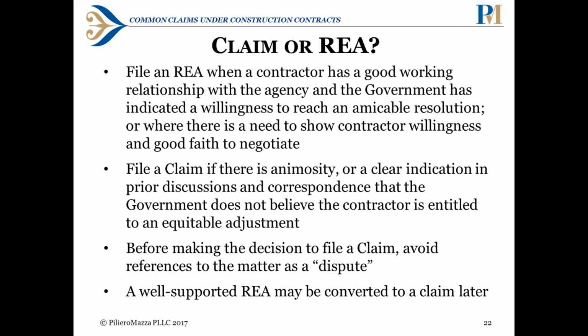those costs. So because you can convert an REA into a claim, we will often advise clients to put together a really well-supported REA, use attorneys, use whatever consultants you need. If the REA gets denied and you're not in a dispute situation, it's pretty easy to then convert that into a claim. You just have to add the magic words at the beginning referencing the CDA, add the certification if it's over $100,000, request the contracting officer's final decision, and you've got a claim.